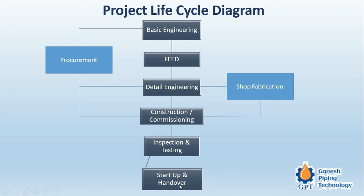Once inspection and testing is satisfactory, the startup and handover of the plant takes place, and the project is complete. For a project with an 1800-day completion time, the final day marks the startup and handover activity. A good planning and project engineer's job is to execute the project as per the plan — if it does not complete within the planned duration, it is considered a failed project management outcome.